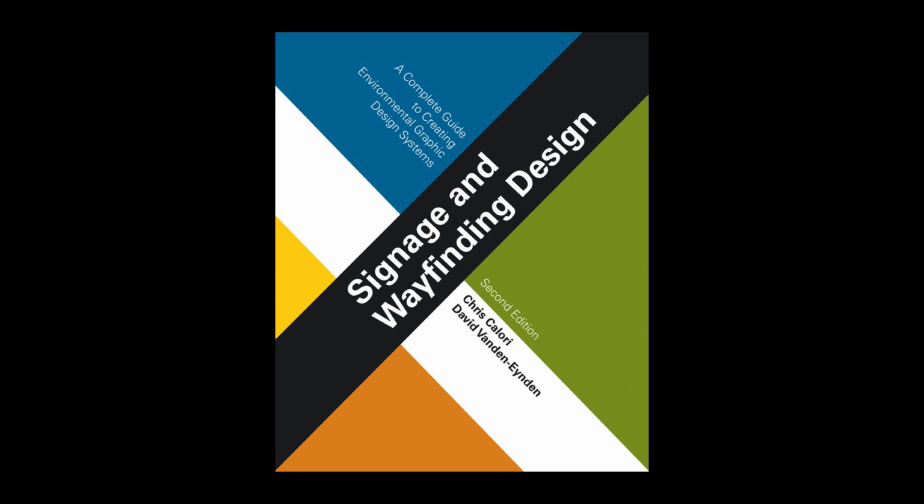It may be helpful to include quantities for each sign type on the bid form, but with the caveat that each bidder is responsible for verifying all quantities.